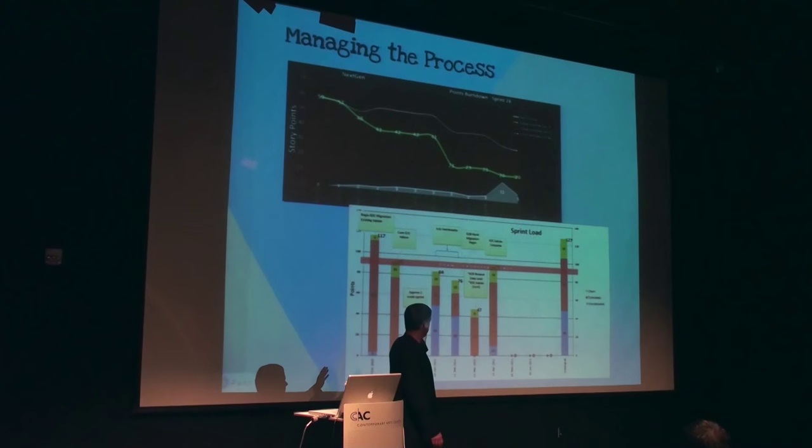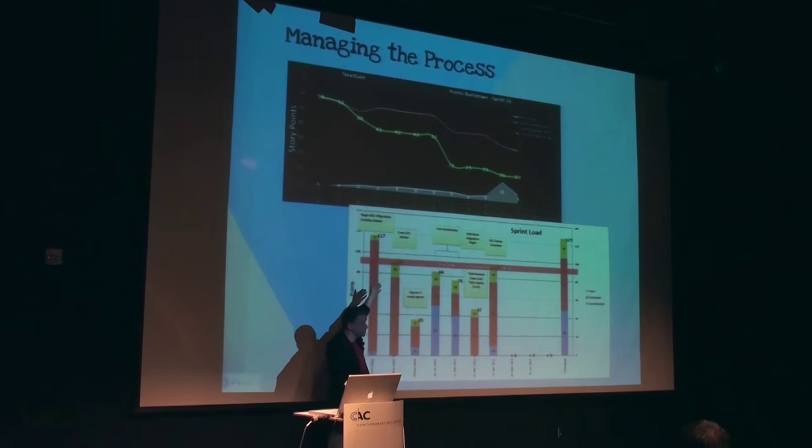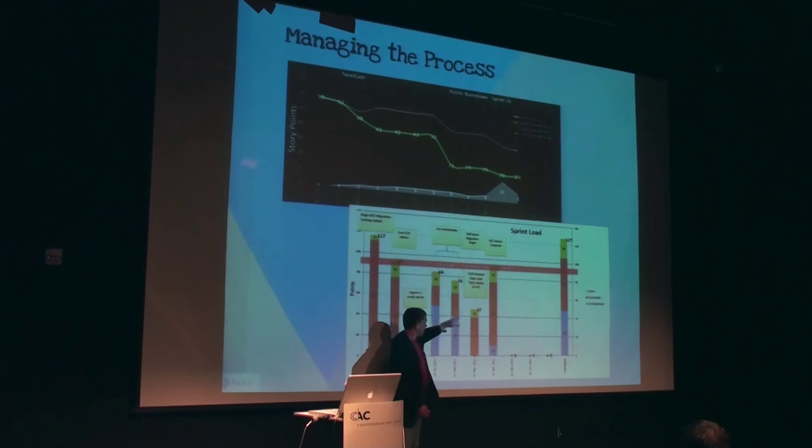By measuring how much the team can get done, which is this constant red line here of team velocity, this team was at 92 points. Basically, that's how much work that team can get done during a period of time. You can begin to plan much more accurately when your system and that set of core requirements will be completed. For the estimated ones, which are the blue, we just use an average across the number of stories or requirements that we have to begin to determine that.